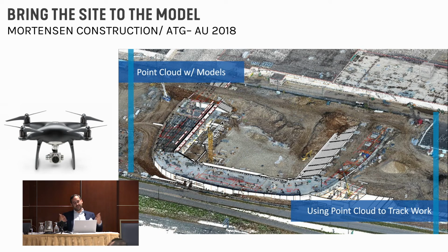So this is actually a presentation I saw at AU this year by Mortensen Construction and ATG. They had this awesome presentation where they showed taking daily or weekly flights with a drone, creating a point cloud, and then bringing it back to the Revit model to measure from that. So that was one option that we could have done, right? If we were sophisticated enough to have that point cloud information, we could have brought it back to the Revit model and compared what was in that to what we have there.